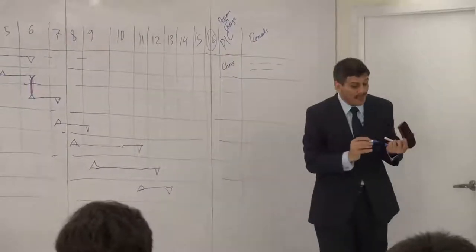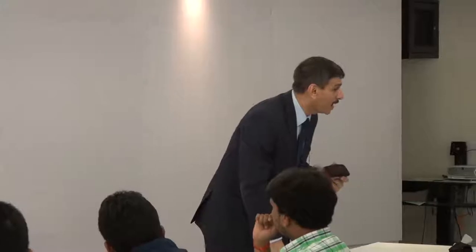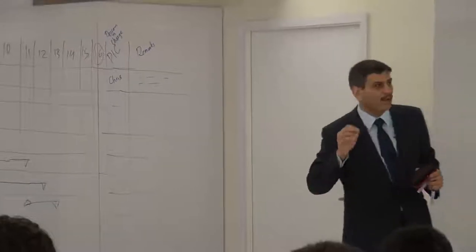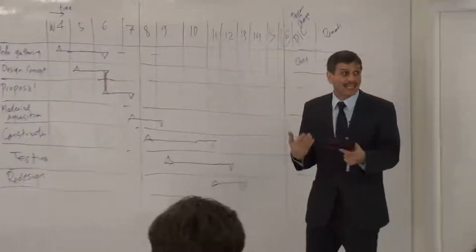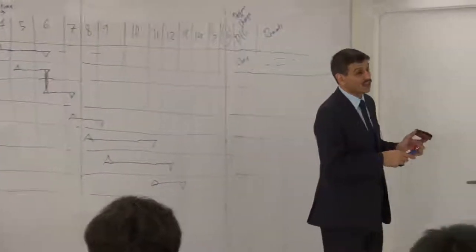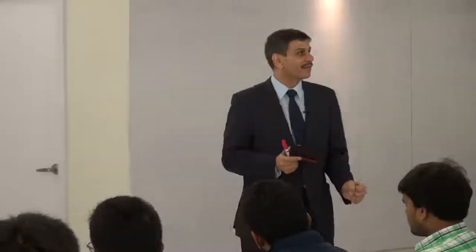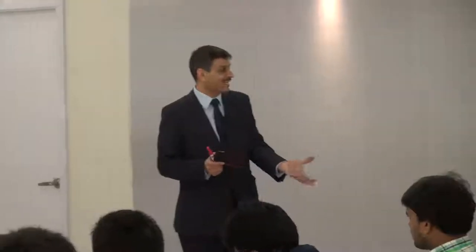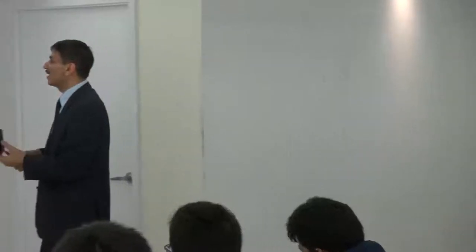If you want to really be safe and manage risk, you set for yourself a new deadline. You say, my robot is going to be ready by week 15. So the test is week 16. I want to finish by week 15 or even 14, depends on what you want, so that if anything happens, you still have time to manage the crisis, rather than the last touch to the robot being made the eve of the testing day. It's going to be very risky because some component may just fail or something may just break, and then you'll be in a bad shape.